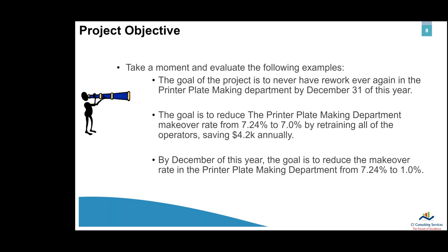Of course, the last one is a bit more realistic. By December of this year, the goal is to reduce the makeover rate from 7.25% to 1%. Okay, that's pretty significant. And chances are good it's not just one thing that we need to do to fix that. It's a series of issues that all contribute to that greater than 7% makeover rate.